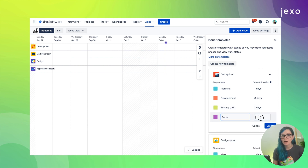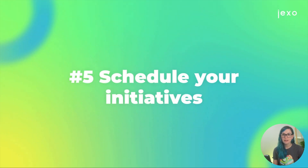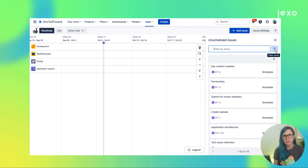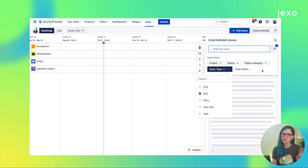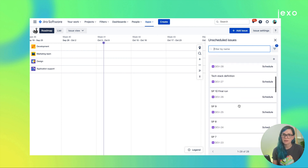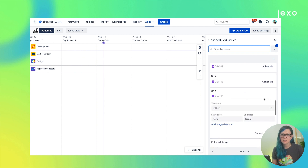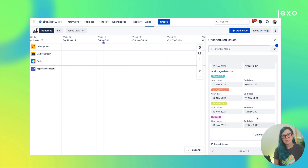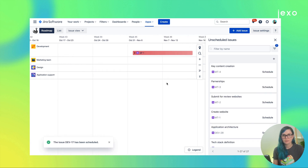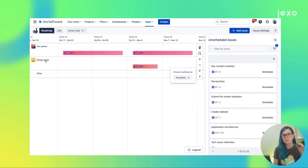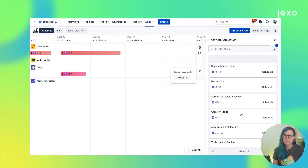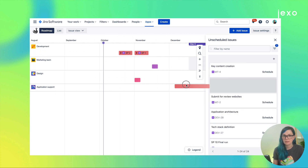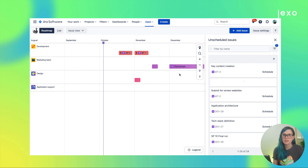Now it's time to start scheduling our initiatives on the timeline. To schedule an initiative, I'll open the plus add issue panel where I can find all issues from my imported projects, with filters available if I need to find a specific issue. There are two ways to schedule an initiative: I can select the template I created earlier, and after selecting the start date the end date is automatically calculated along with the dates for its stages. The second approach is to drag and drop issues onto the timeline from the panel — this is faster but doesn't use the templates.